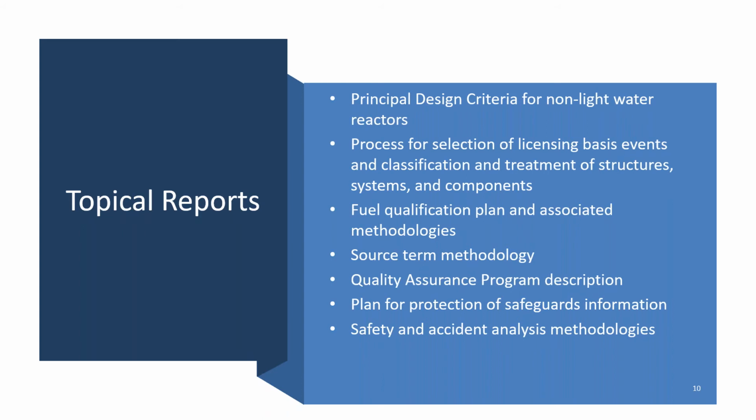We have already looked at the process described in NEI 18-04 and how we have endorsed it. And further guidance on this can be found in Reg Guide 1.233, which is a guidance for a technology inclusive, risk informed, and performance-based methodology to inform the licensing basis and content of applications.